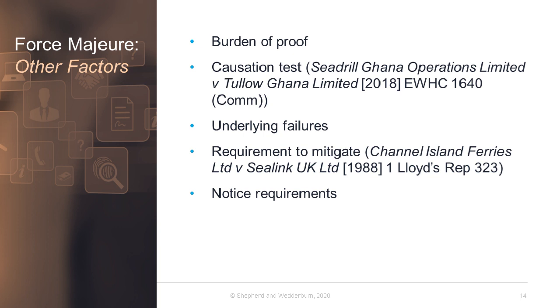Firstly, it's for the party looking to rely on the force majeure clause to prove that the event or circumstances fall within the contractual provisions and that their non-performance was caused by that event or those circumstances. The party will also need to meet the causation requirements of that clause. It's important to note that the courts do not take lightly the matter of a party seeking to avoid obligations that they've freely undertaken.